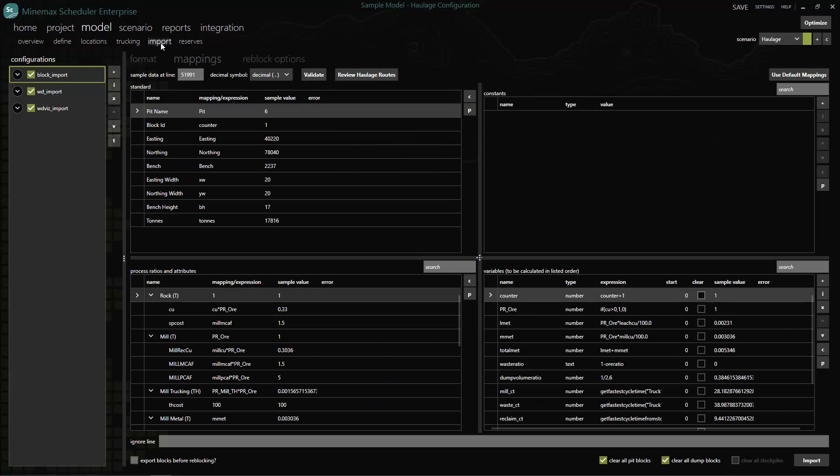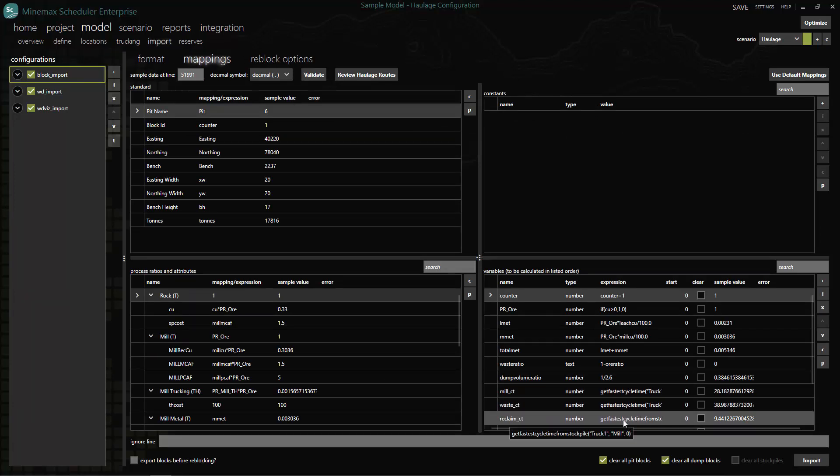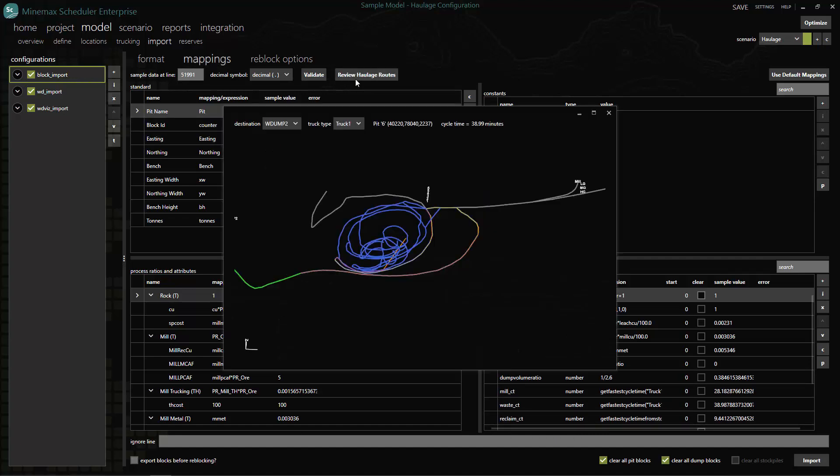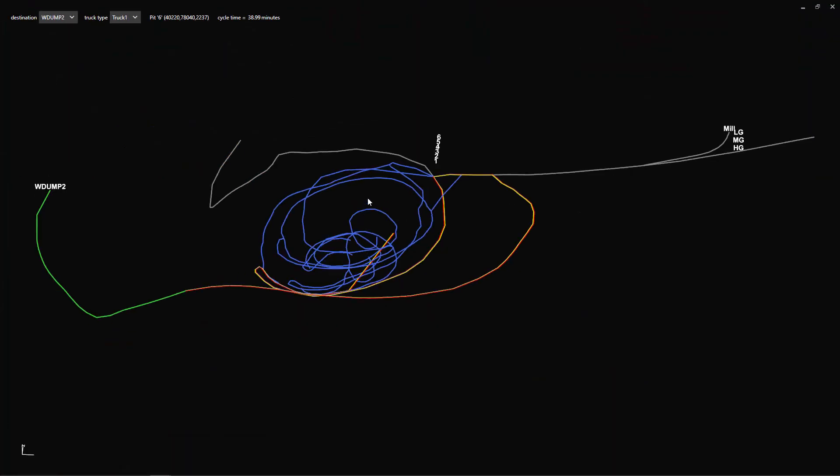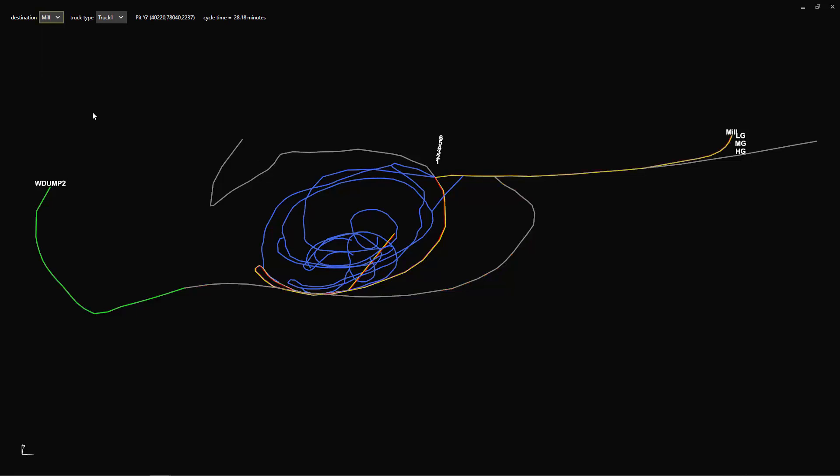To tie it all together, we map the cycle times to the relevant truck hour processes using the import configuration variable functionality. The new review haulage routes button allows you to visually validate a specific haulage route for a given block and to review cycle times to destinations.